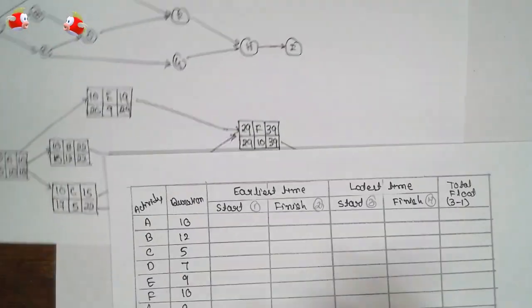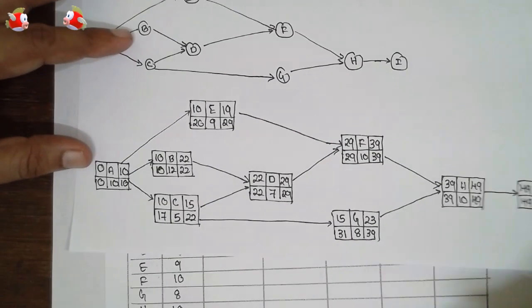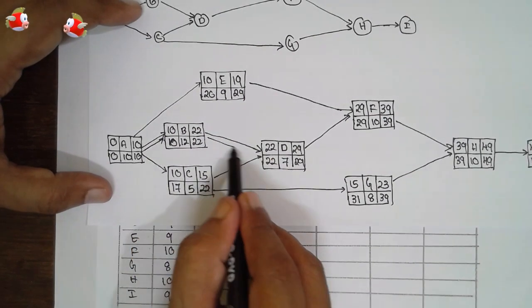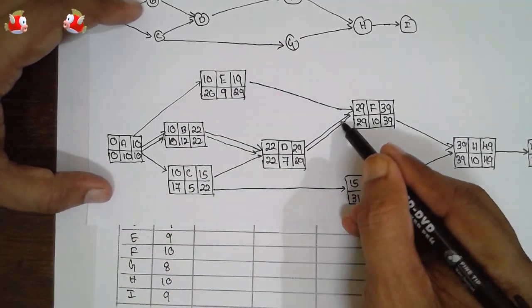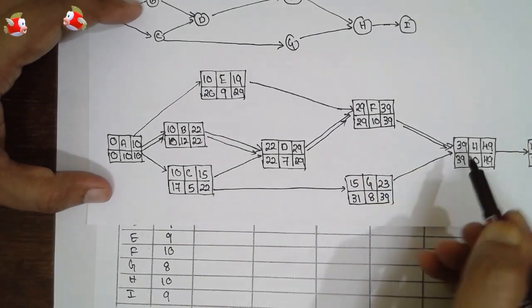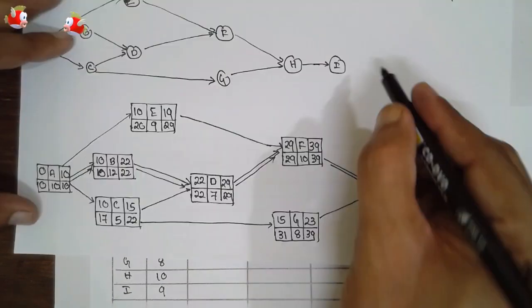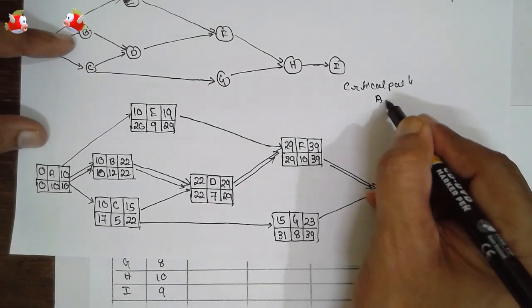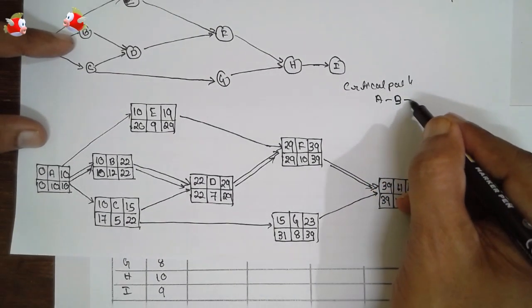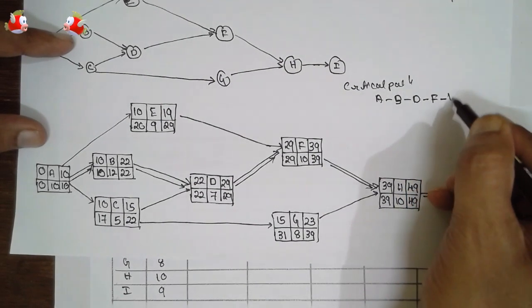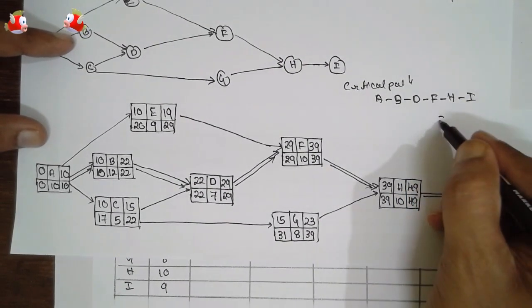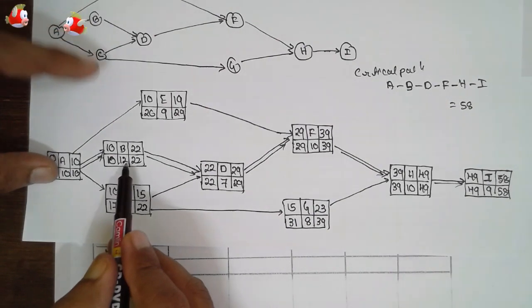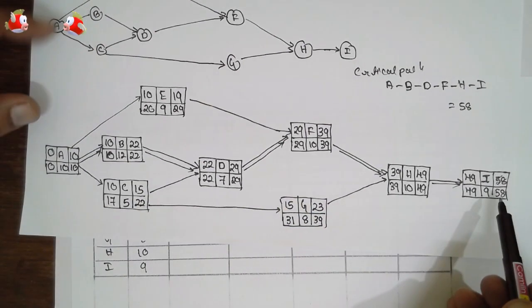Now based on the network diagram, first draw the critical path here: 10, 10, 0, 22, 22 is the critical path. 29, 29, 39, 39. This is the critical path. Write the critical path: A dash B, B dash D, D dash F, F dash H, H dash I. If you calculate, the value will be 58. That means 10 plus 12 plus 7 plus 10 plus 10 plus 9. This is nothing but 58.